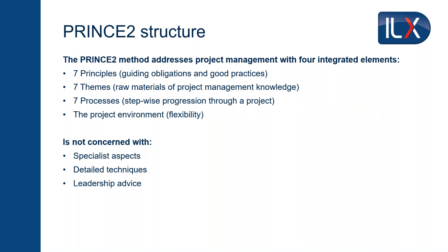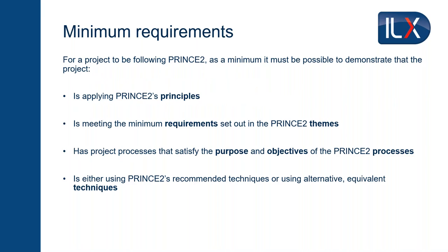One thing seen in the past was that organisations adopted PRINCE2 and got what's called PINOT — PRINCE2 In Name Only. We say we're using PRINCE2 but not actually using much of it. So the PRINCE2 manual suggests there are some minimum requirements. If you're going to run a PRINCE2 project, you have to do certain things. You must be doing the seven principles to show minimum requirements. For each of the themes there are some minimum requirements, generally about having enough to control the elements of a smallest project.